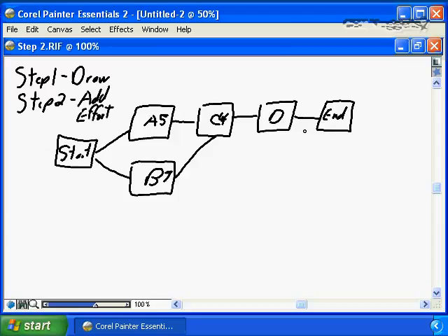Now, again, for simplicity in this network diagram, I'm assuming I have a single resource working full-time days at 100% availability, and saying that resource number 1 is going to work on task A, dedicated, uninterrupted, and is going to get it done with 5 days worth of effort, i.e. 5 days worth of duration.